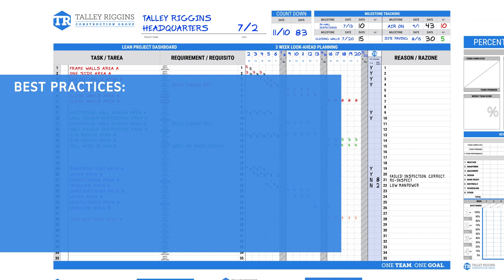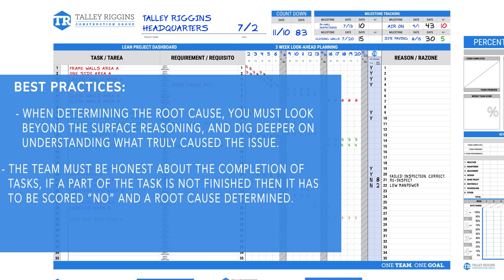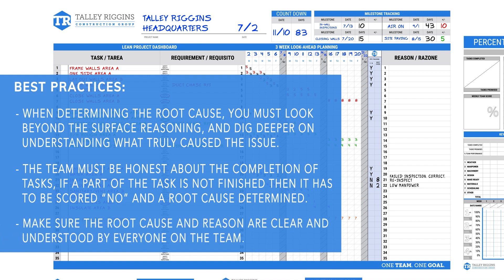Best practice tips: When determining the root cause, you must look beyond the surface reasoning and dig deeper on understanding what truly caused the issue. The team must be honest about the completion of tasks. If a part of the task is not finished, then it has to be scored no and a root cause determined. Make sure the root cause and reason are clear and understood by everyone on the team.